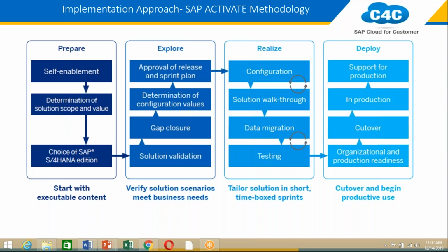There is no separate testing phase. All the testing and development activities are carried out in the realize phase. And also in every quarter of a project duration, apart from a sprint, we also give a system walkthrough to the customer, showing what we have achieved till now in the system.